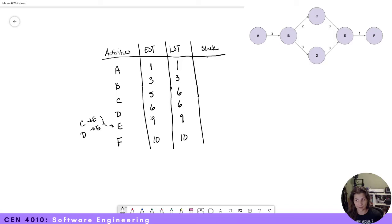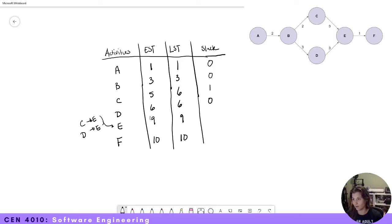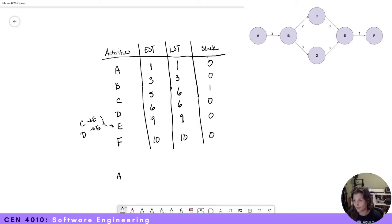Now we've calculated the latest start date. Let's do our slack. Slack is our latest start date minus our earliest start date. So our slack for A is zero, zero for B, for C it is one, for D it is zero, for E it is zero, and for F it is zero. From this, we are now able to find our critical path. Our critical path is A, B, D, E, and F.